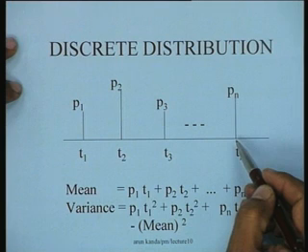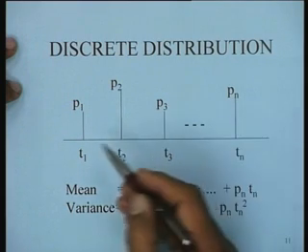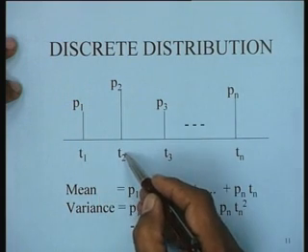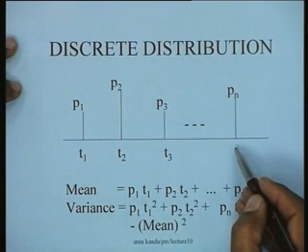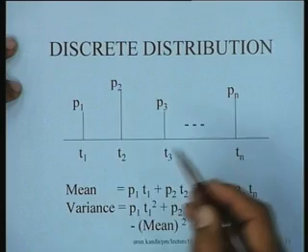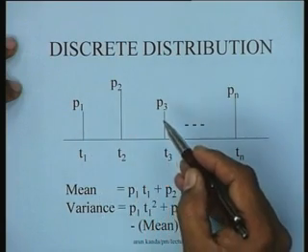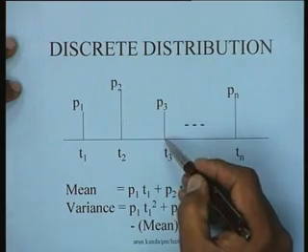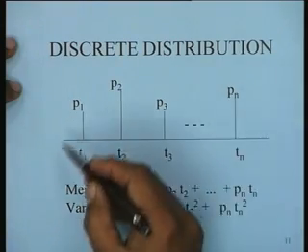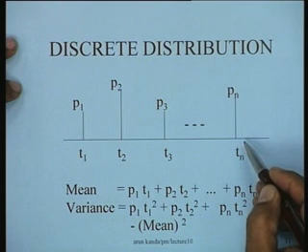You see, this may happen, for instance, if you have the historical record of the time that a particular activity took, right. So it might have taken either 10 days or 12 days or 15 days or 20 days in the past, and if you have done it for say 100 times, you would know how many times it took 10 days and how many times it took 20 days and how many times it took 30 days and so on. And these estimates would be then estimates of the probability that you have for this distribution.